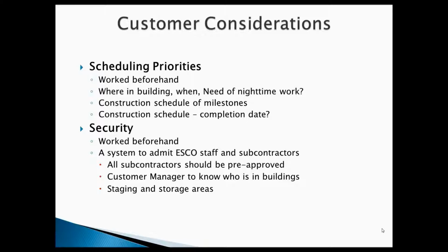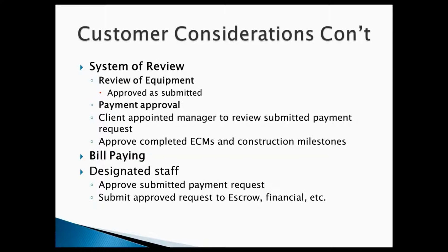You also want to prearrange staging and storage areas for equipment. If equipment is delivered and you're not going to start installation for 2 days, you need to have someplace to put that equipment. So all staging and storage areas should be a consideration before the construction start date.